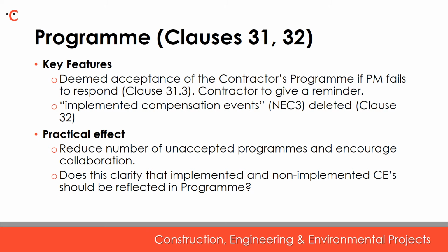However, some commentators are already querying whether or not this could affect the quality of programs in the event that a project manager doesn't respond to a reminder, and so the contractor's program stands by default as the accepted program. Equally, does the 2-week period give the project manager enough time to review and consider the program submitted by the contractor, particularly if he is worried about taking on liability?